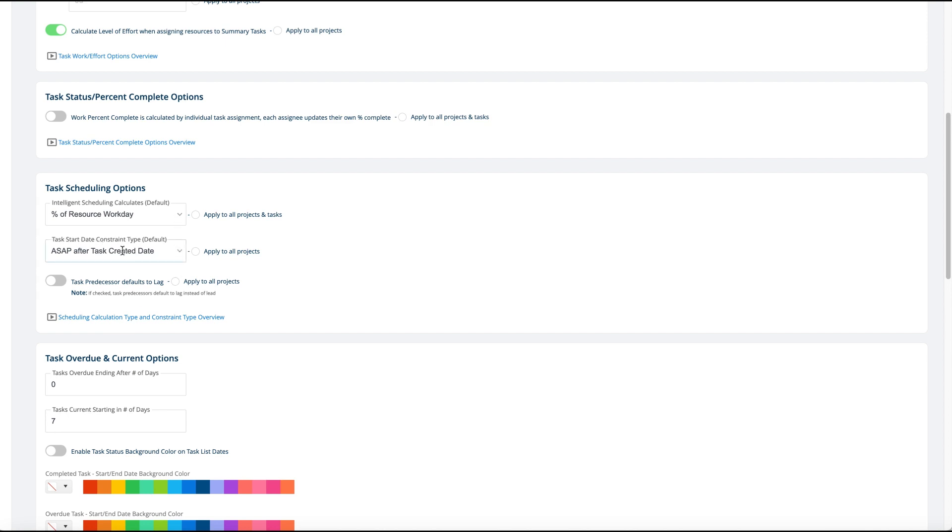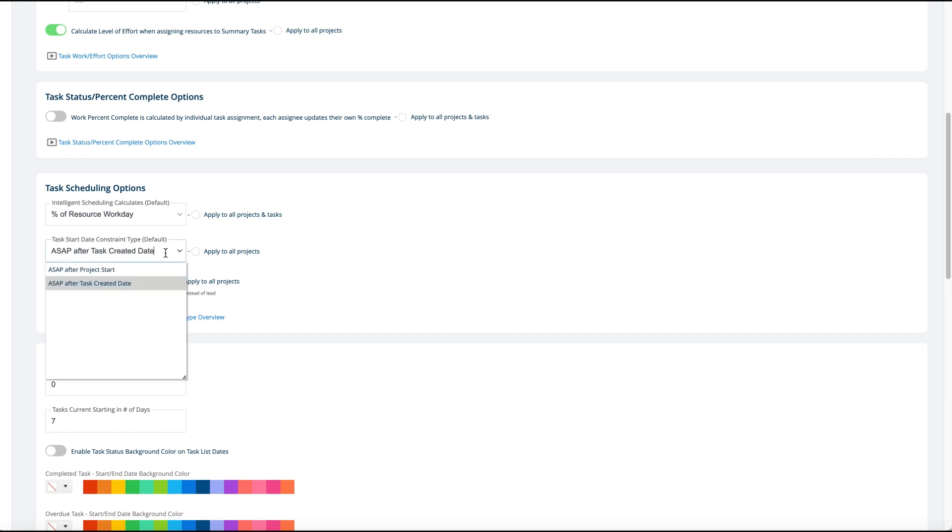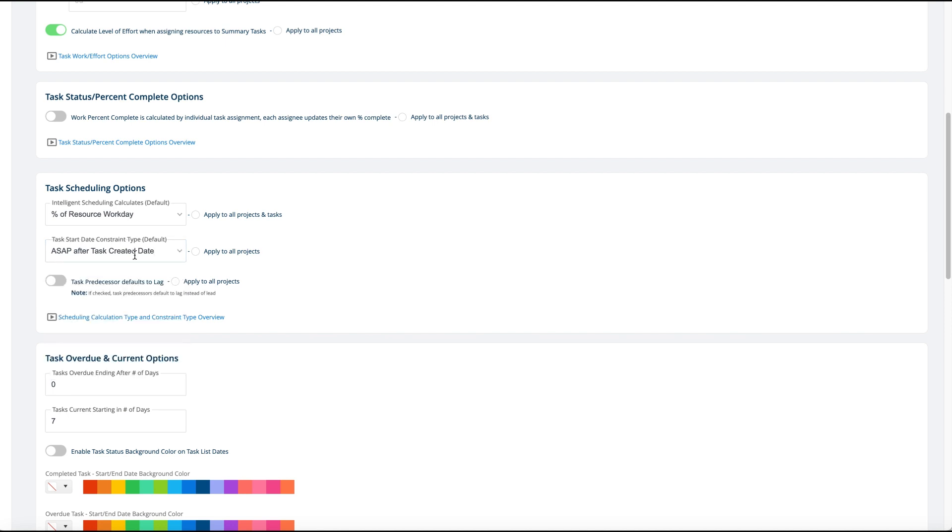Also there's a task constraint type default, normally ASAP after task created is our default, which means if you start a task today and there's no predecessors, the task will basically start today. If you add one in today, another default which is more like Microsoft Project is ASAP after the project start date.